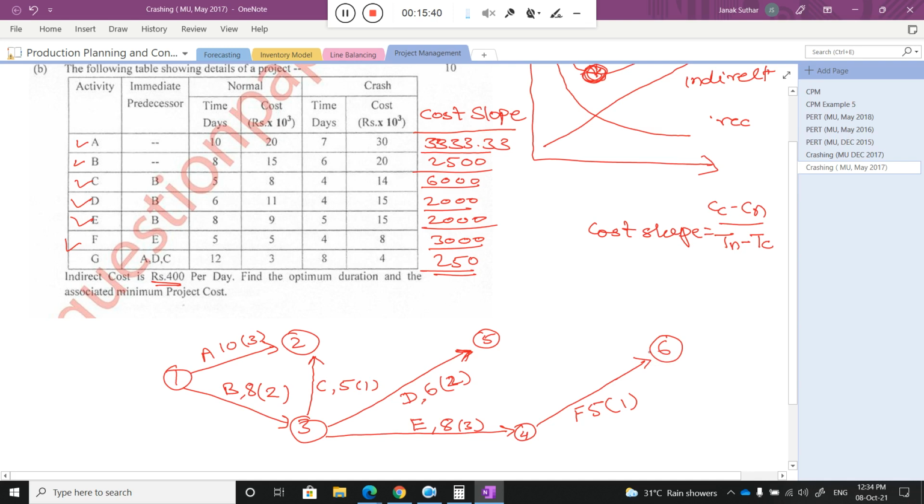So what will I do, that is the very critical thing. Dummy, very good. So what will I do here, what is the question? A, D, C must be complete. D is completed here. This is the start point of the D. This is the end point of the D. Now how do I show this particular point, node number 5, where A, C, D, all three activities are completed? So here I will represent this by using the dummy activity. So this is the dummy.